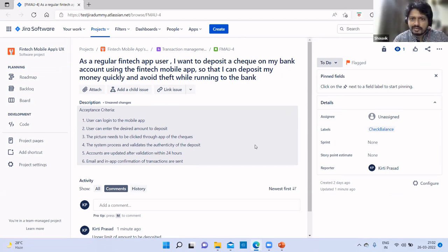Okay, Kirti, just a quick thought. I'm thinking building an in-house app may take a long time and it may impact the deliverables that we have in mind as per our PI planning, right? So the point someone suggested, like the third-party app, is it possible that we can do a quick spike to check how feasible that is? What are the security controls over there? If it matches our requirements, maybe it will save us some time. Just a thought.